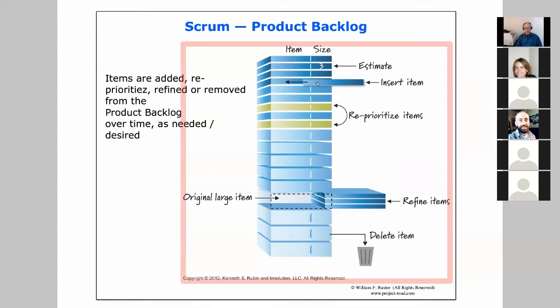So we're putting less checks and balances into change requests. We're staying very receptive. Change requests become new user stories or new product backlog items that get clarified and shuffled into the product backlog where appropriate.